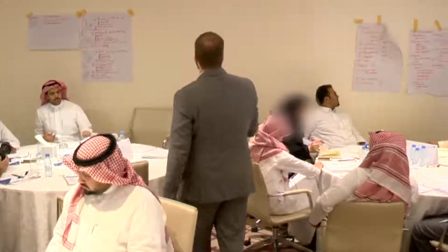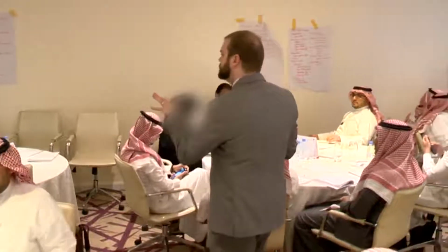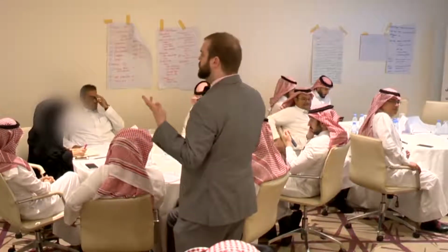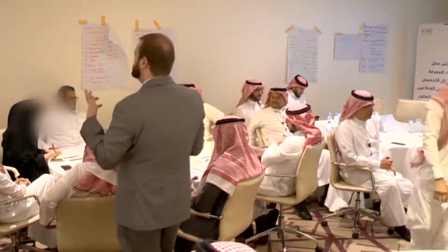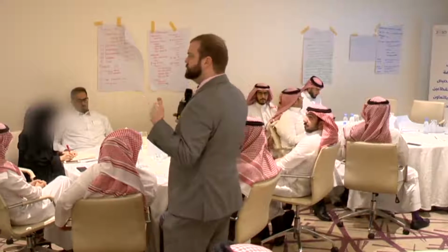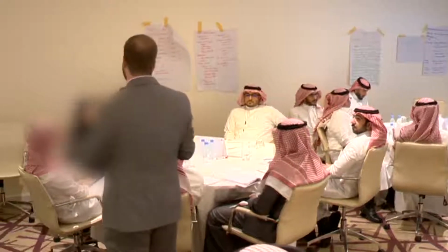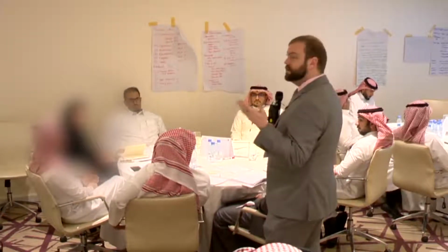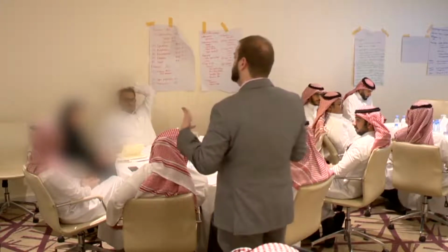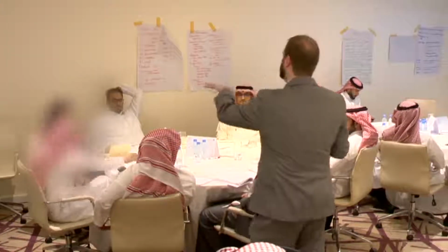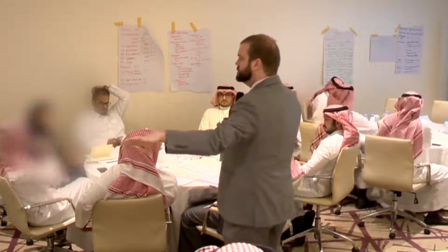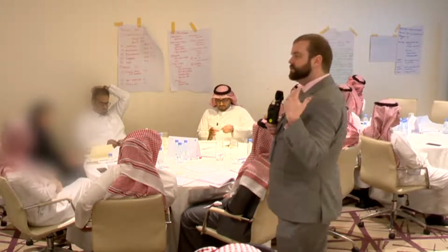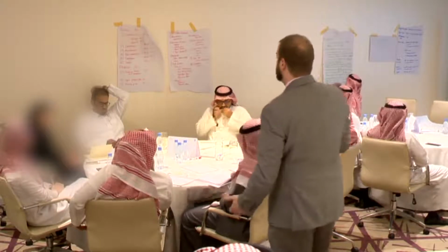Thanks. Something to consider: I've heard a lot that the government will take control over buying the property, so that's a good part, but what is the decision of what property needs to be bought? When you're doing the feasibility study from the government side, you have this idea in your head, but the private sector may come in and provide new and inventive ways of acquiring land. Maybe they will only need to take out a few houses as opposed to the whole development. So consider these things, as opposed to putting them purely on the government side as a risk, allowing the private sector to provide some innovation to it.